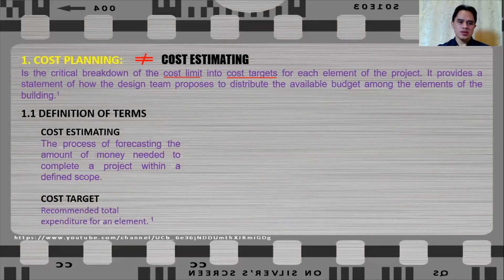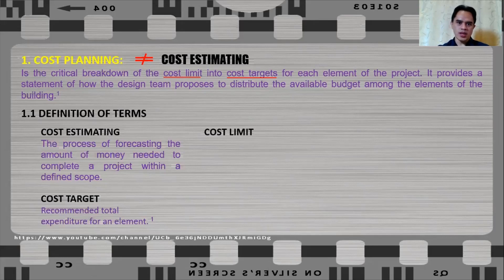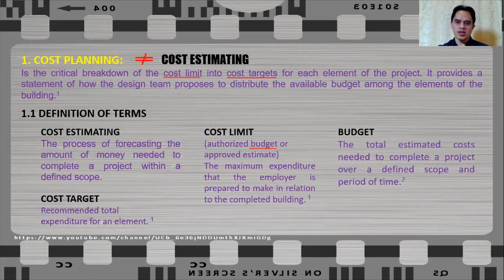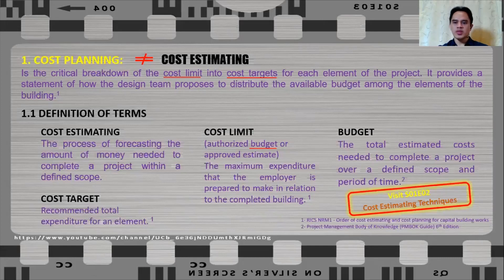Cost target is the recommended total expenditure for an element. While cost limit is the authorized budget or the approved cost estimate — it is the maximum expenditure that the employer is prepared to make in relation to the completed building. Budget is the total estimated cost needed to complete a project over a defined scope and period of time. If you want to know more about budget, you can visit my previous video, Season 1 Episode 2 of Quantification and Costing of Works, where I talk about cost estimating techniques.